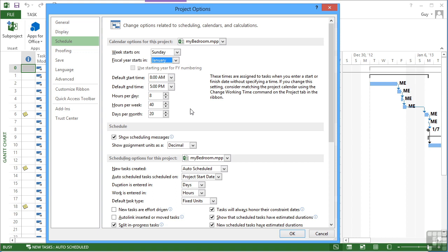So one day task lasts eight hours. If we now shorten our working day to 7.5 hours, which is fairly common, then our tasks will take longer than a day - only half an hour longer than a day, but they will take longer than a day. So it's not really a value that should be edited once a project is created, but we'll try changing it now.